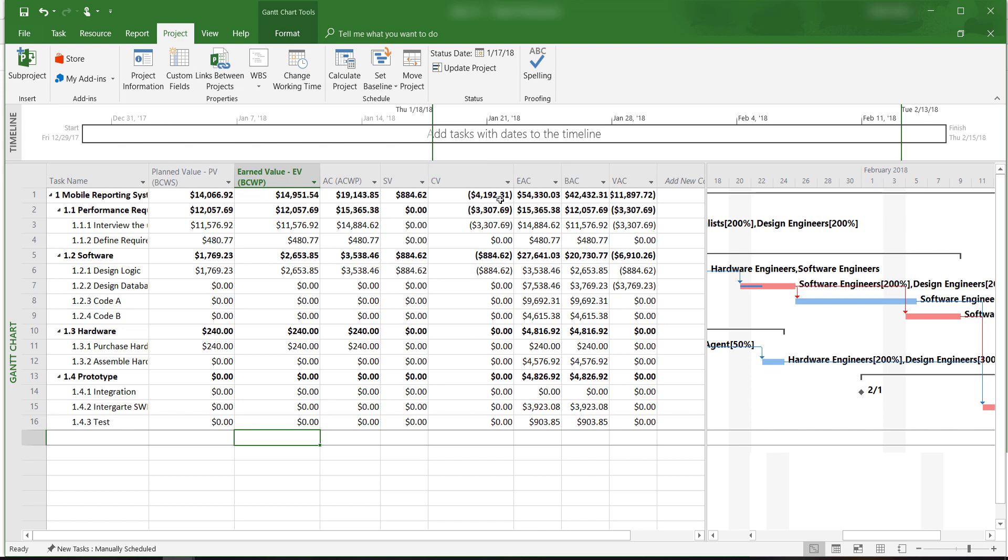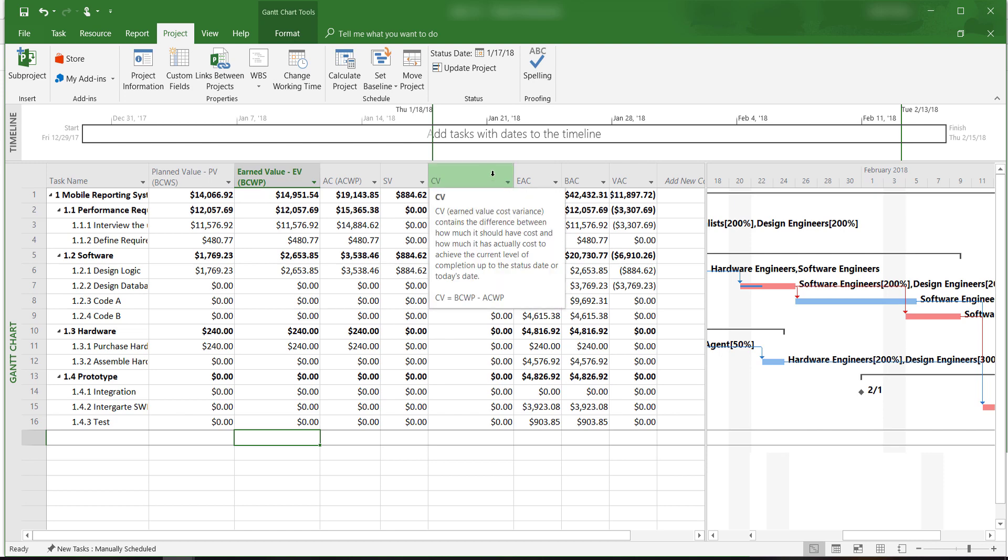But we have a negative cost variance. This indicates that based on the work actually completed, we are over budgeted by approximately $4,200.